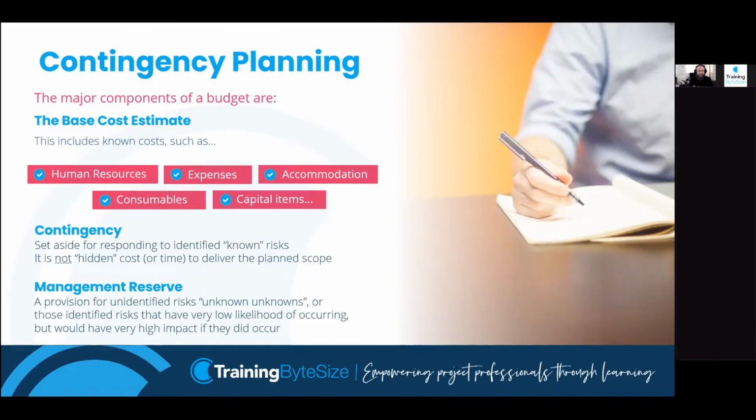Then we have another part of the budget set aside called contingency. Contingency is for identified or known risk. I like to refer to it as known unknowns myself. So these are risks we predict. We have a risk register for them, and then we have ways to respond to risk, and those responses will usually require money. We have a contingency fund to supply those responses with some cash without having to dip into our base cost estimate or ask our sponsor or financer for more money to manage the risk. We already have the money set aside in contingency.